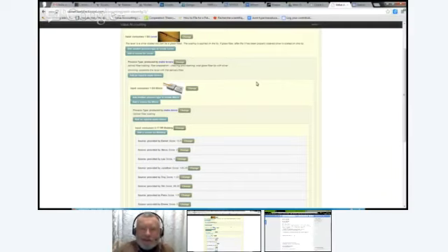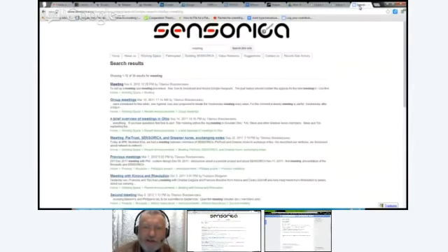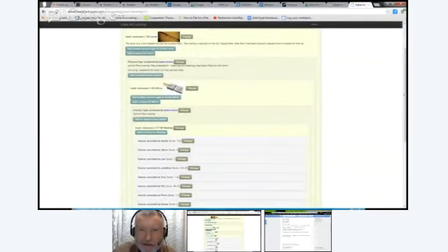However, what happens with his algorithm, and I have actually implemented his optimization algorithm, is that it's pretty close to optimal. However, the closer you get to optimal, the less stable is the result. So his algorithm would change the schedule of manufacturing processes radically with every little change in any of the conditions of the situation.